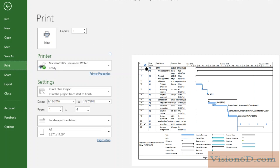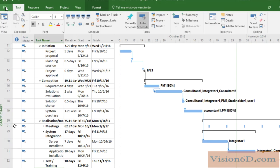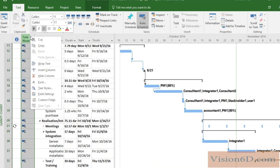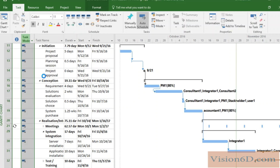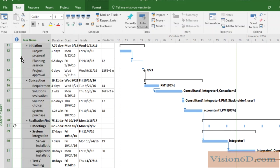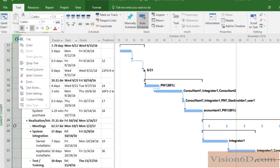As you see, we have some columns that you might not want to print. So in order to do that, I go back here in the Gantt chart itself. I could diminish those columns, but you can also simply make them disappear by hiding them. You hide the column, and I will hide here the information column also.